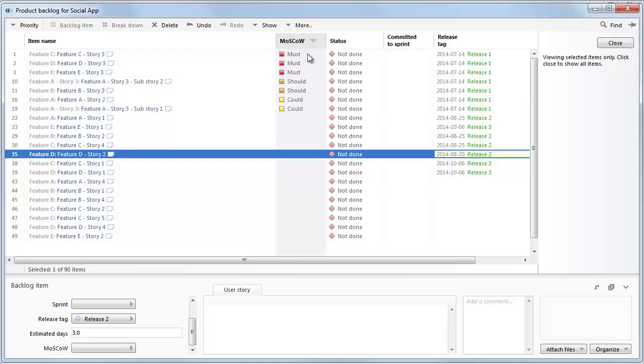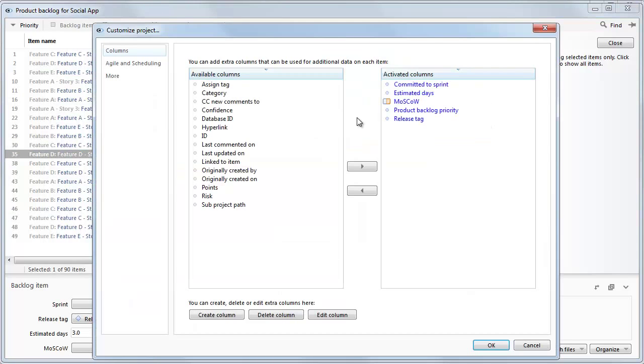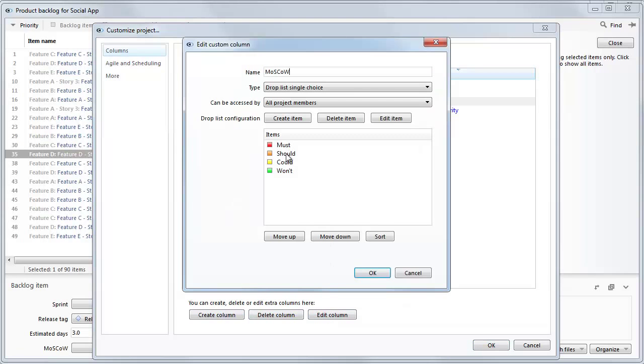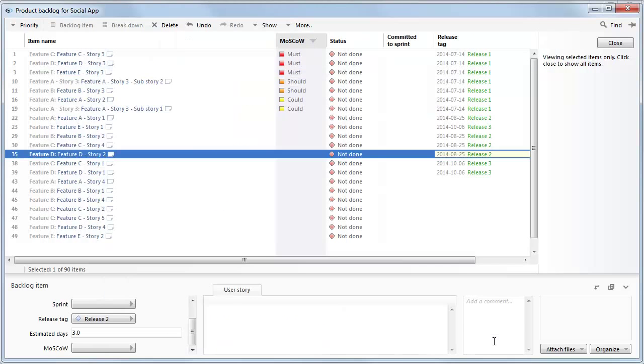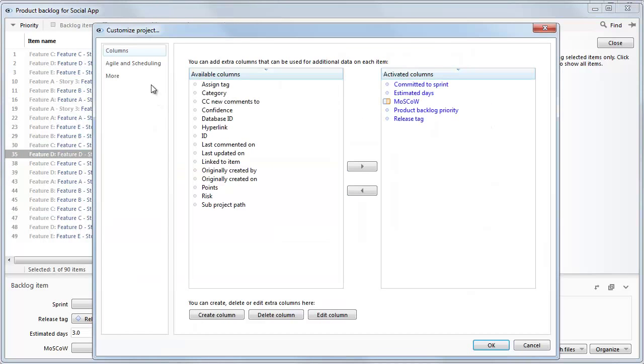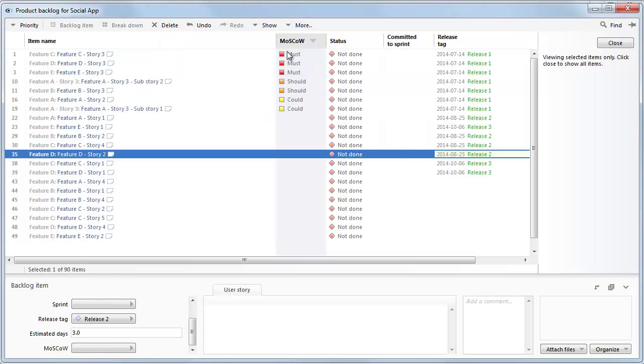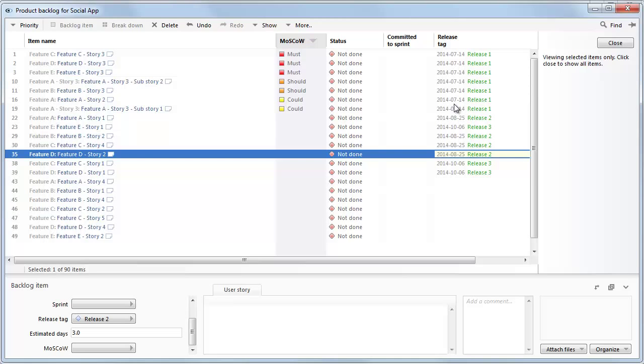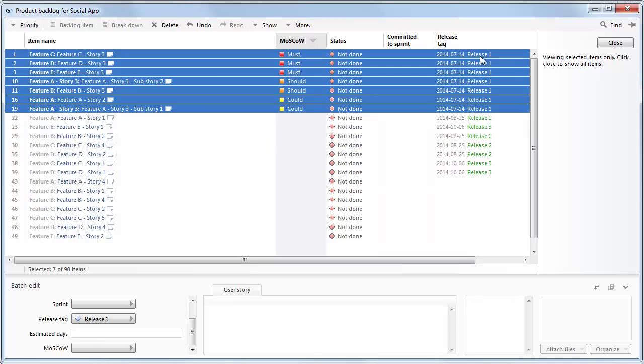And then I've also changed the product backlog prioritization column to Moscow. This is just a personal preference. There's a lot of other naming conventions you can use for prioritizations. To do that, you can just create a custom column like this one. And enter the choices or the wording you want to use for prioritization. And just add it to the product backlog. And finally, you also need to set the product backlog to use the Moscow column as priority if you want to use drag and drop. What you also can see here then is that I've only prioritized the latest release. So my thought here is that you use the release tag to kind of say, we plan to do these features in this release. And then these features in that release. And then these in the third release. Whereas we only go into detail to prioritize the next upcoming release.